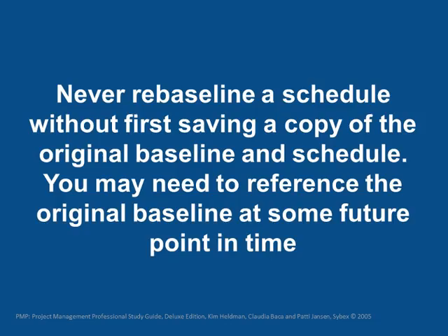This one here is probably just common sense, but we wanted to mention it anyway. According to the book Project Management Professional Study Guide Deluxe Edition, you should never rebaseline a schedule without first saving a copy of the original baseline and schedule. You may need to reference the original baseline at some future point in time. So take care when rebaselining a project schedule because you may lose the original baseline information.